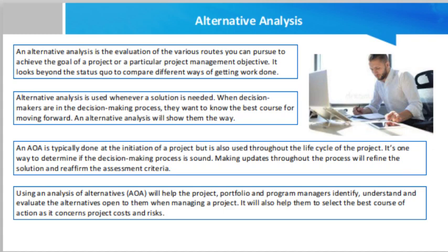Then identify and define the alternatives. Now you identify the various alternatives, the routes you can take from the data sources. There will be many, but be sure to keep one of them as the status quo. These alternatives will address the problem you stated in your plan within the context and scope you have already defined. The alternatives you evaluate must come out of thorough research, vetting, and filtering before you can begin the decision making process.